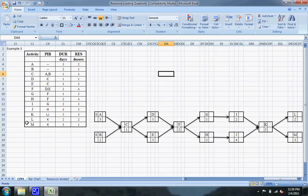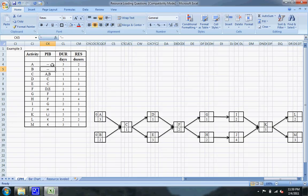We have all of our activities, what they are preceded immediately by, the duration, and the resources. I went ahead and made this CPM diagram to save some time. You can see that A and B are two activities that start because neither of them are preceded immediately by anything. Both arrows go to C because C is preceded immediately by A and B. D and E are both preceded immediately by C, so an arrow goes from C to both of those.